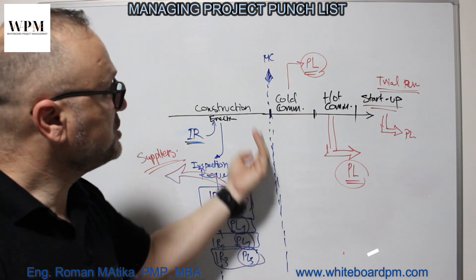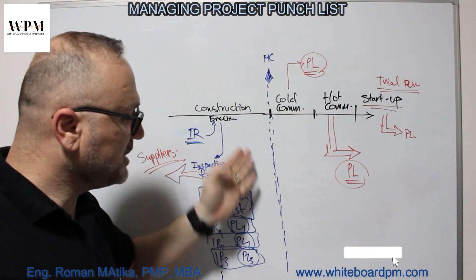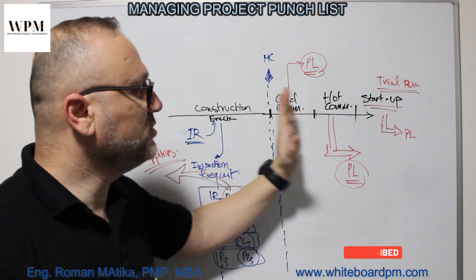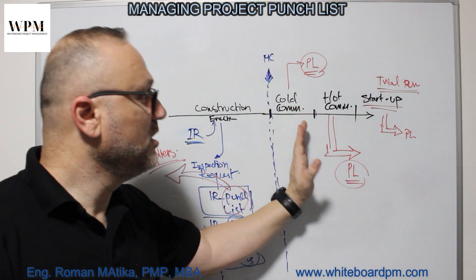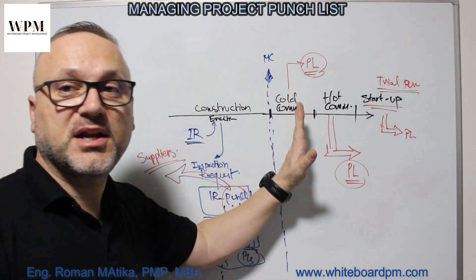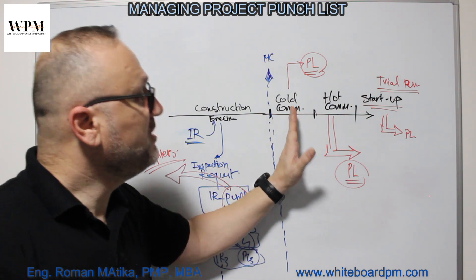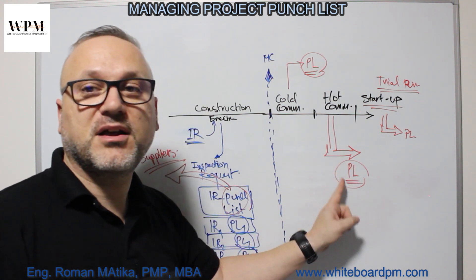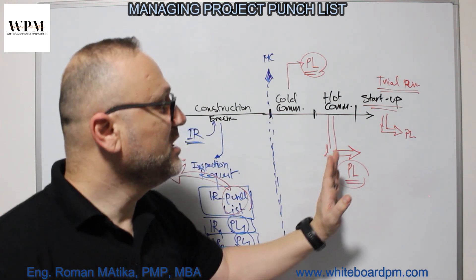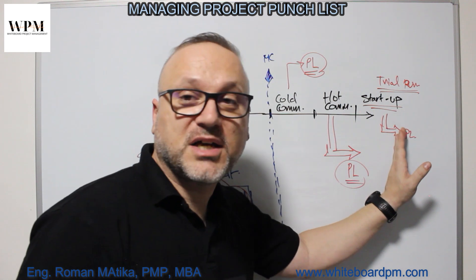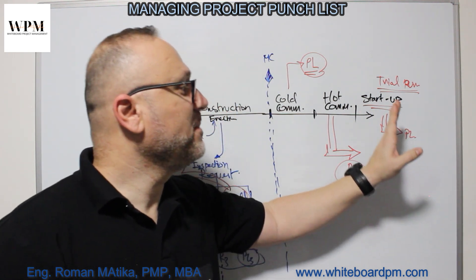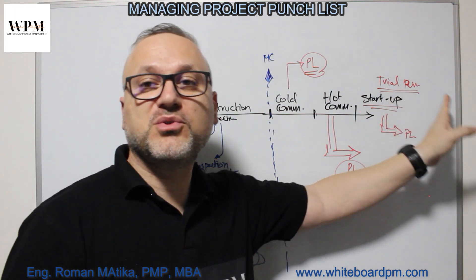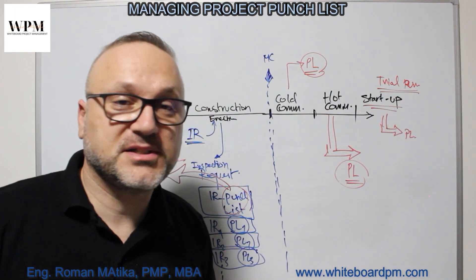At the mechanical completion stage, some punch lists are mandatory to be finished before going to the next stage. From cold commissioning, there are mandatory punch lists before going to hot commissioning. From hot commissioning, there are mandatory punch lists to be done before going to startup. And for startup, there are mandatory punch lists to be completed before achieving a reliable startup.